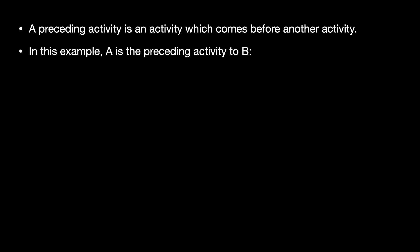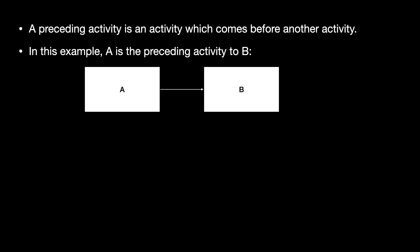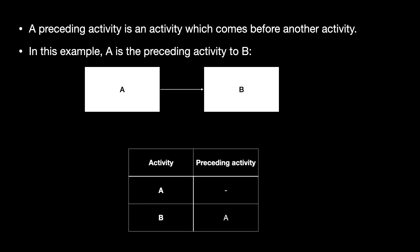Before we go ahead, certain basic concepts. A preceding activity is an activity which comes before another activity. In this example, A is the preceding activity to B. You can also show this with the help of a table. In the first column you have the activities A and B, and to the right you have the preceding activities, with A having no preceding activity, and the preceding activity of B being activity A.